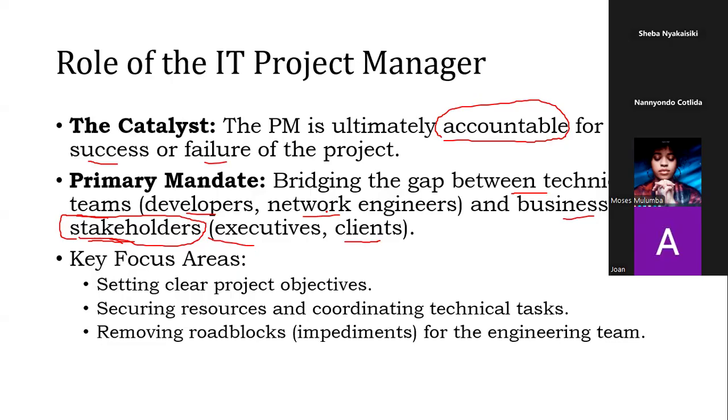What does management, the customer care department and customers expect? That is you trying to pick out the features, the system requirements. Then you go out and shop for vendors, those who have developed systems. Then you identify them and start the process of how to implement it. You draw out a plan and say you need this and this. You draw up a budget, you build out timelines, and then you start the implementation process.